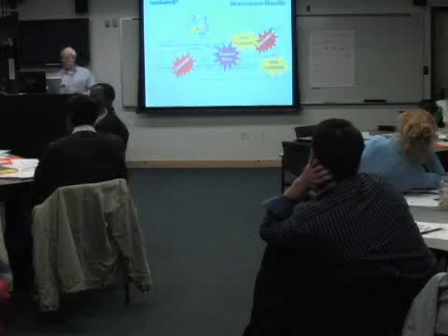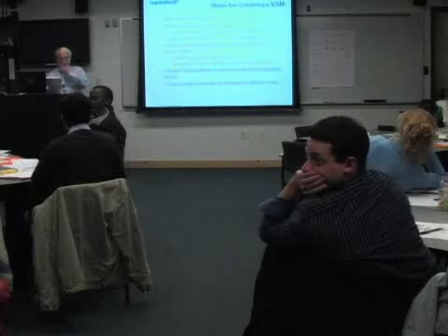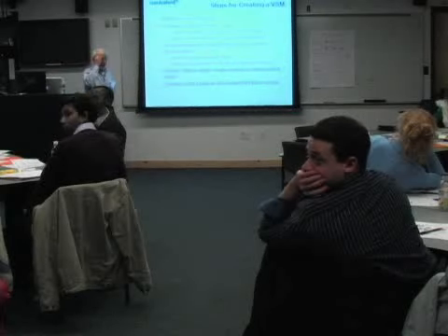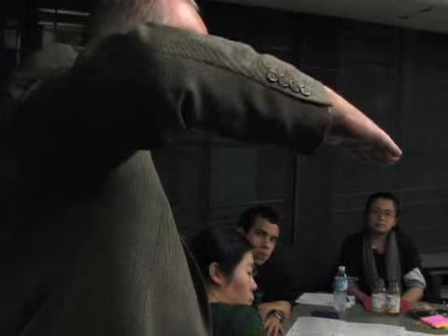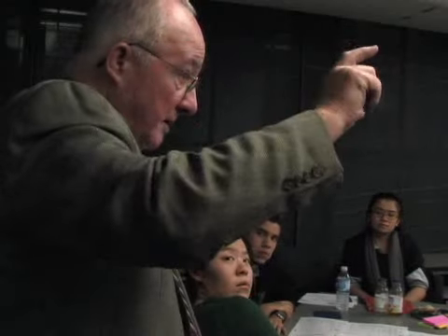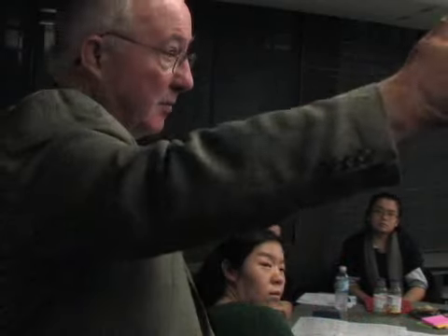Another thing that Earl's seen out there, we took one of the Arizona State team through the Apache production line, and we actually incentivize the employees to beat the schedule. They help schedule, but there's a schedule goal, a cost goal, and a quality goal. If they beat that goal and actually reduce the learning curve better than what we put in the business plan, we share that underrun with the employees, so they're motivated to beat all 3 goals. And it's not just pushing out the door, it's got to be high quality or the Army won't accept it.